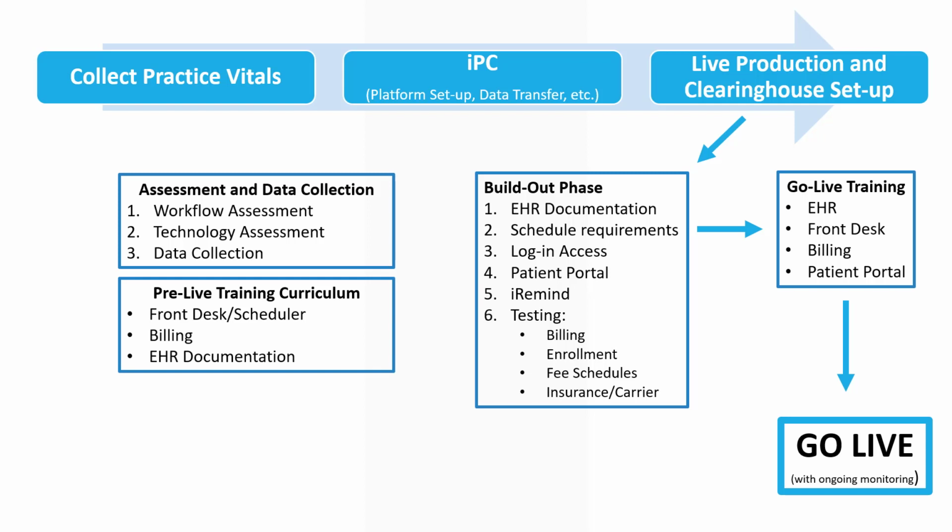There could be a requirement from you, the client, that you would like some data transferred out of your current system into this system. All of those details get worked out by the iPatient Care engineers, who are absolutely brilliant people. As they work with that platform setup, they bring it to a point over time, usually anywhere from a week to 10 days to 2 weeks, maybe longer depending on the difficulty of the data transfer.